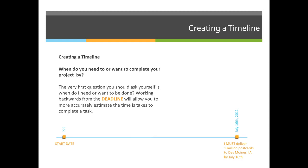Once you have a list of all the things you'll have to complete, you can create a timeline. The very first thing you should do when creating a timeline is ask: when do I want or need to be done with this project? Working backwards from a deadline allows you to know the very last day you can start a project. For example, if you're changing the oil in your car and want to be done by 2 o'clock, you can determine you have to start by 12:15.